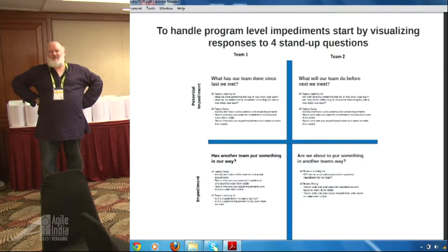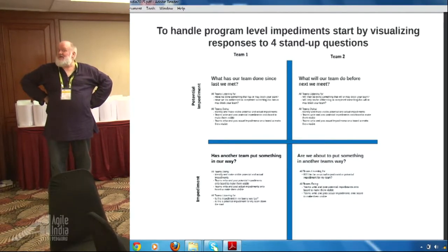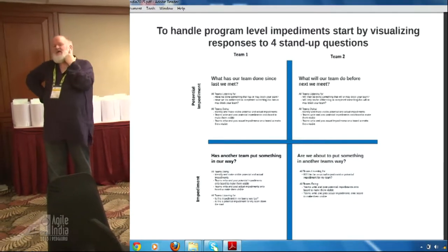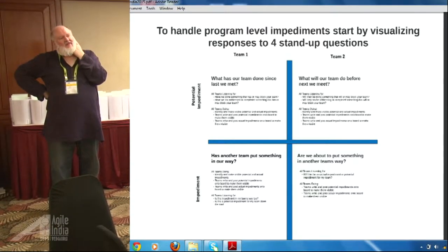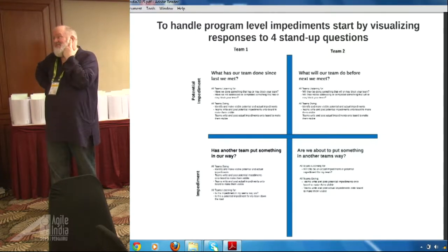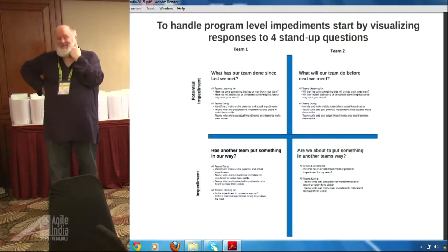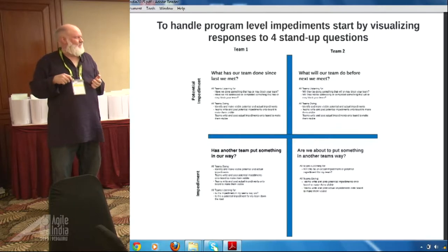And we're going to do a stand-up every day. And we're going to look at things on one line. What we're going to listen for is, I'm going to listen to the stand-up. Is something somebody else is going to be doing potentially blocking me? Right? Or is something somebody else is doing going to block me today? And we're just going to make those obstacles and impediments visible.